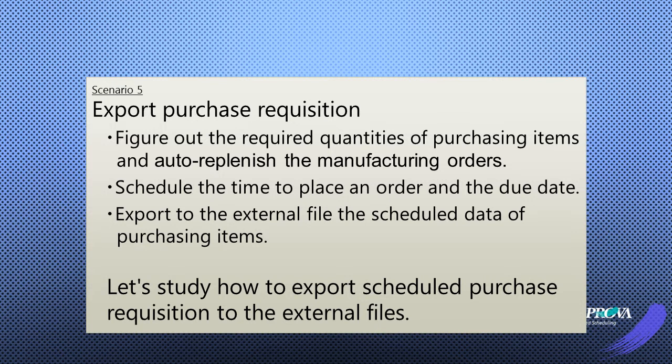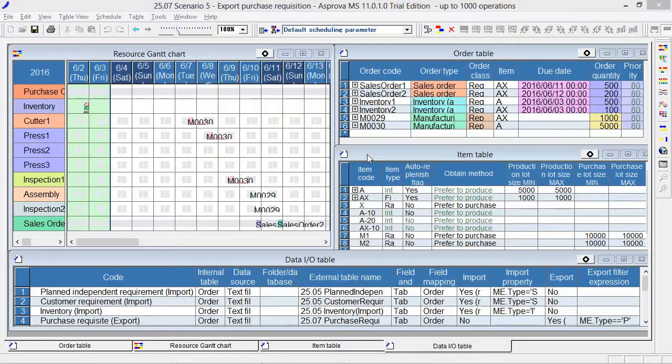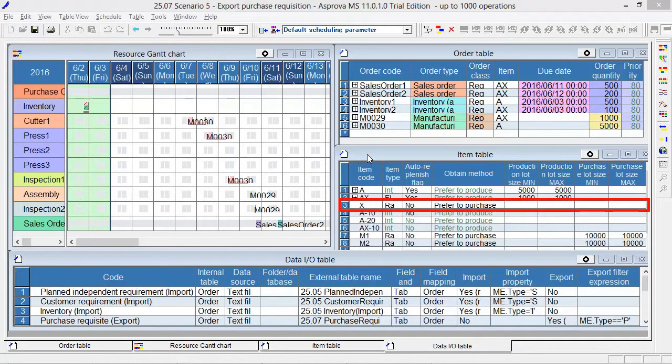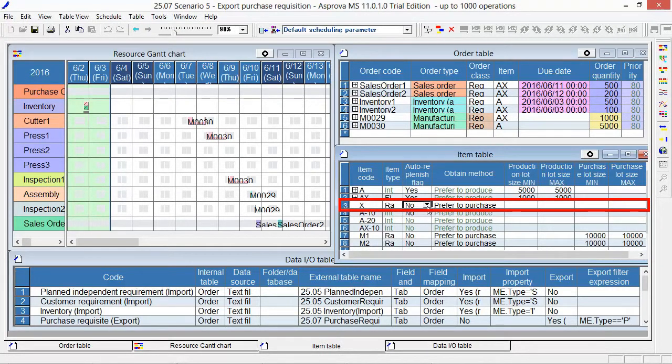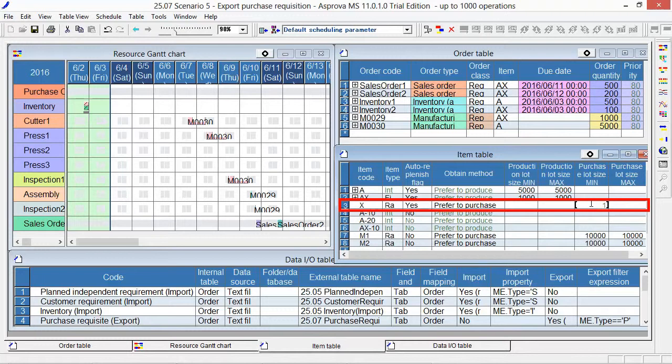Let's export to the external file the scheduled due dates and quantities of purchasing items. Let's start with the last state of Scenario 4. X is a purchase item. Switch the Auto Replenish flag to Yes in the Item table. Set Prefer to Purchase as Obtain method and 10,000 as Purchase Lot Size Min Max.